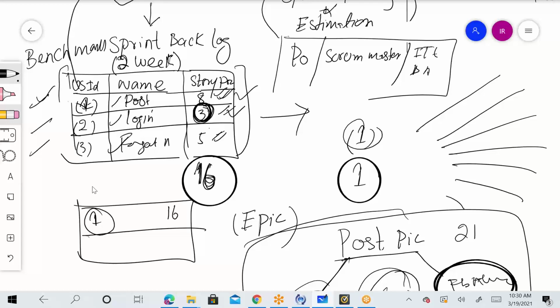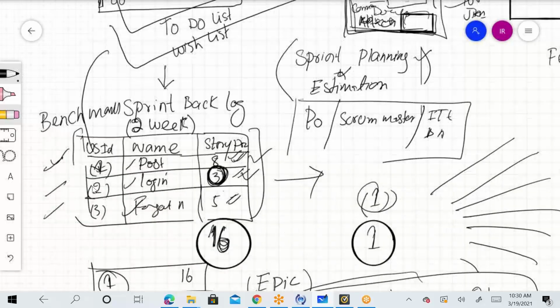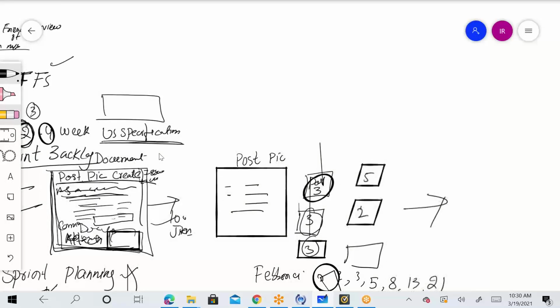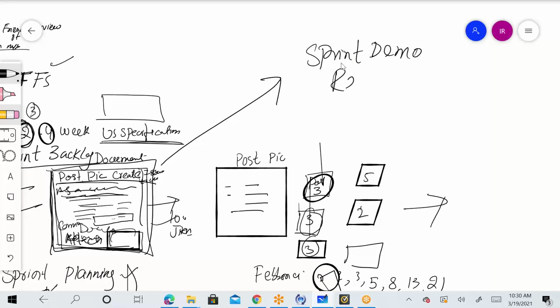And during that sprint timeline, you will be working on the next stories, because there are 100 tickets and documentation has only been done for 10 so far. So I'm going to see what other tickets and stories I have to work on. I have to write the user story specification document. So BAs will be continuously working on documents, and then once your sprint is over, once your 2-week timeline is over, there's a meeting conducted with business users, called the sprint demo meeting or sprint review meeting.